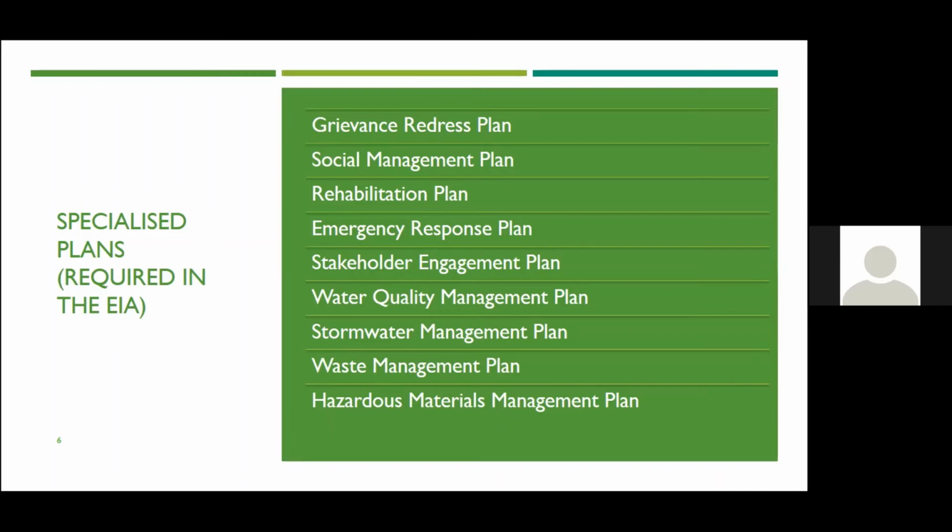The emergency response plan: this plan is developed based on a qualitative assessment of the quarry risk, and the qualitative assessment of the risk associated with the operations of the quarry, and this would identify any credible risk scenarios. There will be a discussion of consequences and likelihood, and ultimately an identification of the protective measures. So the existing ERP will be updated with the procedures to respond to emergencies, incidents, and accidents associated with the activities in the new areas.